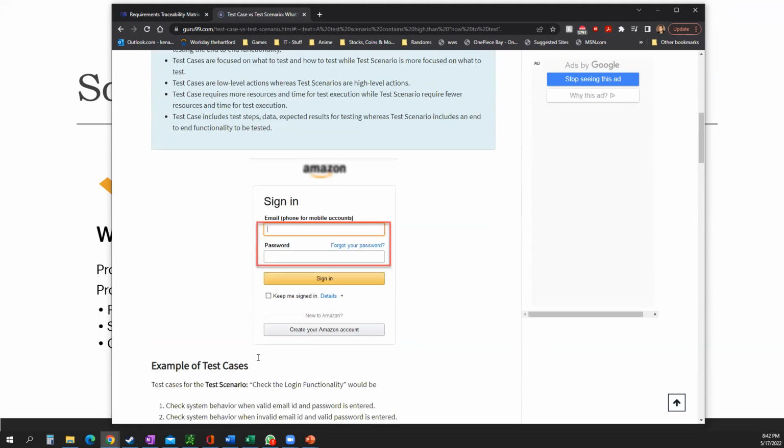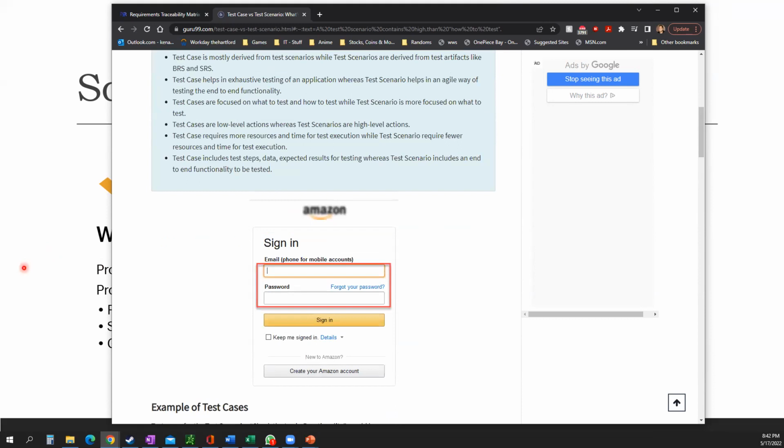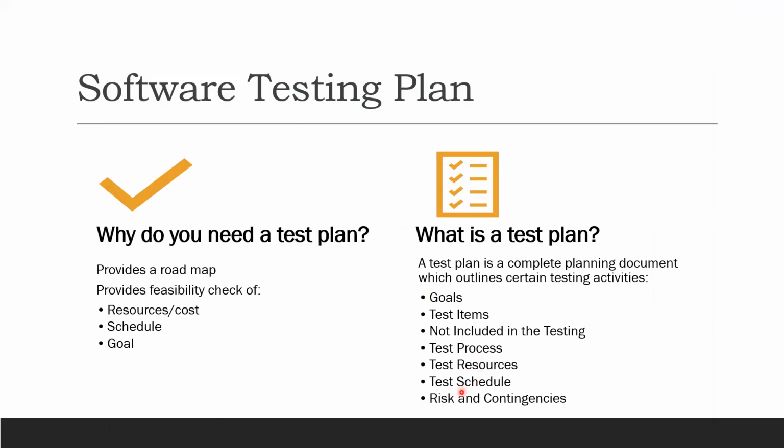So if that is the case, going back here, then it becomes a risk because whenever you're sending the request for data creation, it takes about 2 days for your data to come back. So if you send a request today, it'll come back on Friday, or on Thursday. So that is time wasted. That is time that you could have continued to test, right? So that goes in as a risk.